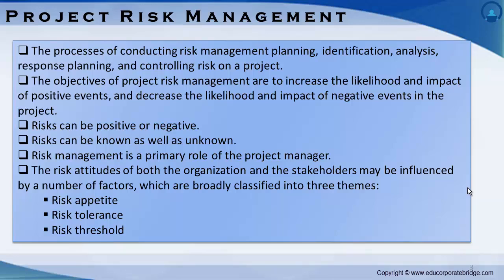In my experience, positive risks, which are referred to as opportunities, must be identified early in the planning processes to take advantage of them in the project. Otherwise, the cost and schedule impact of changing the plan will typically outweigh the benefit of the opportunities. Negative risks, which are referred to as threats, can be avoided if addressed early. However, these must be monitored and tracked throughout the life of the project.